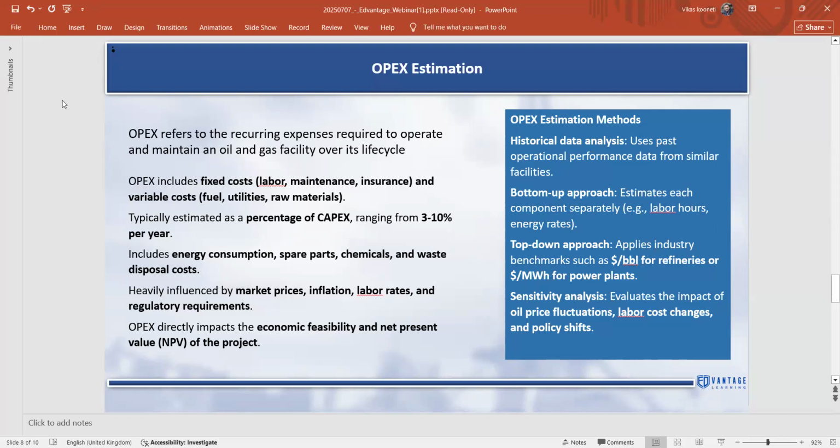So this is during an initial stage. Very initial. Let's say you're just at a greenfield. You are at a very young stage. You just don't know any data. You don't know the numbers. Maybe things can be plus or minus. So you might just go with, okay, my OPEX per year can be around 3% or 5% or 10%. Right? You just go with that.